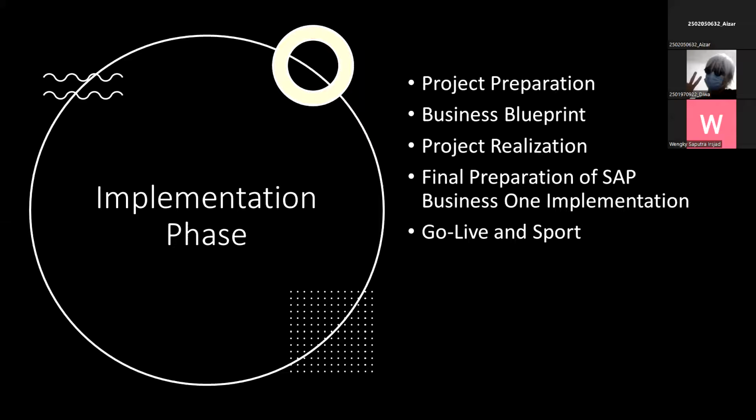So the step-by-step of the project realization is first, installation and customization based on business blueprint, data migration, system setup validation, system testing, initiative of cutover activities, and project phase review and sign off. The SAP Business One production system is installed and customized by the consultant after validating and updating the configuration. The business consultant, with the support from the client IT administration, install all SAP Business One components like operating system, database, patches, and etc. on the client hardware.